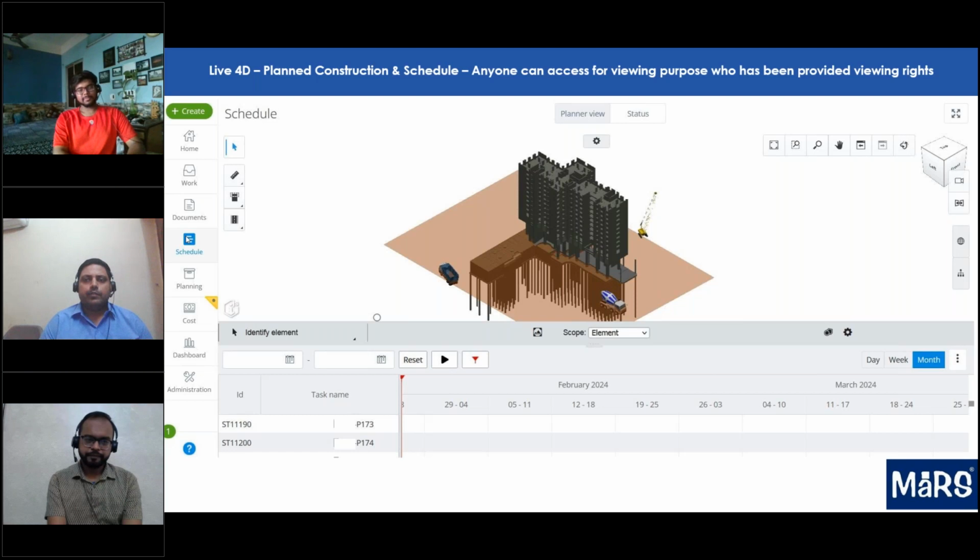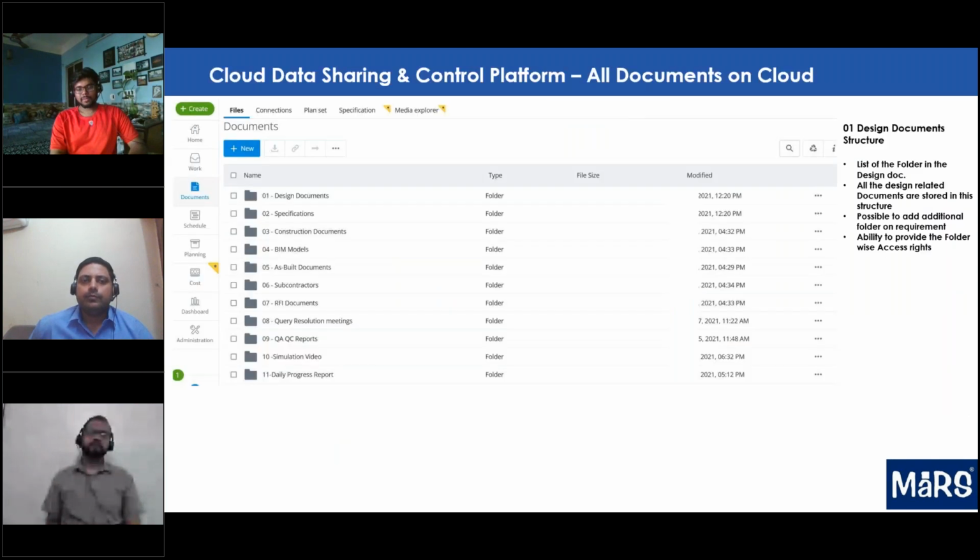That's the main thing for the client ultimately to understand. For example, if 100 crore rupees is the budget and 100% of the civil structure related construction has been completed, then MEP started, and the cost has reached a certain level. That can directly be associated in Synchro control, and in Synchro 4D we can feed each parameter for every single element, which can be associated with the cost as well.